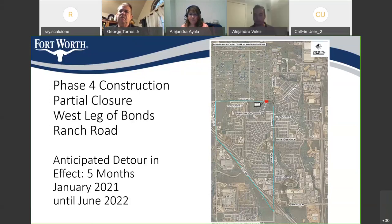Yes. So the plan is for that water line coming off of the water tower north of Golden Triangle to happen in the low demand season, like Alejandro said, between December 1st and March 1st. We have a 48-hour allotted time to make these connections. These are big water pipes, 36-inch ductile iron. It takes a while to get the work done correctly so we don't have to shut down the line again afterwards. So we'll potentially be using the 48 hours completely, because we want to get it done right once and not have to shut the service again. And that's the best answer I can give you.